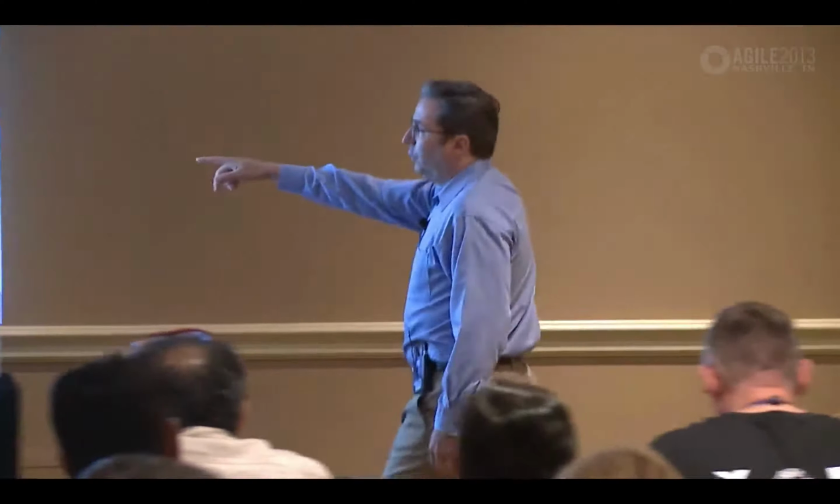The numbers in red represent waiting times, right, at various steps in the process? So, 2 days waiting between the idea being generated and we start grooming the idea down. Once it's groomed, it sits in queue for 2 weeks before we actually give it to the development teams. Maybe that's 1 sprint, right? It waits for a sprint and then it gets allocated to the teams. They're working, say, 3 weeks here. There's a 6-week wait in front of the art team. We'll talk about that in a moment, right? And so on. You get the idea across the grid.